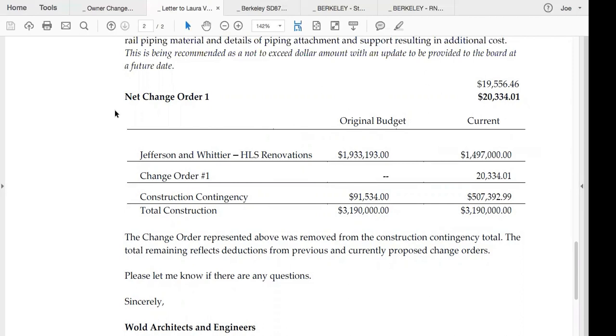But Riley North Lake will have to hold out until construction is done because they've got field verified openings and things for the window shades. So the room signage, the roof signage, and all the window blinds for both campuses are in this budget. We got good bid day competition. We had 5 bidders, all within thousands of dollars of each other, which is unusual. One standalone bidder was a little lower than the pack, and they are the apparent low, but they are standing by their bid.